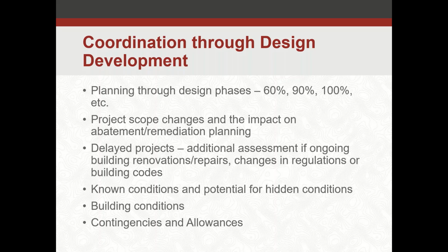Maybe your regulations changed. Maybe there's a more stringent requirement that 2 years ago you didn't have to meet, and now you have to add that into your project. So it's important to relook at things if you do have a delayed project.